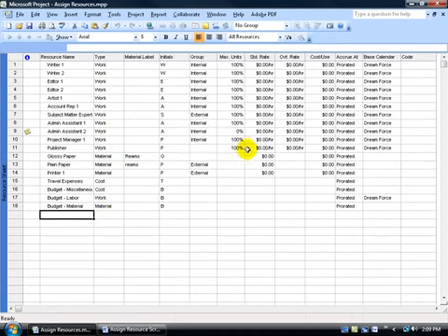Now keep in mind we haven't assigned any of our resources a cost. Like for our writer, you've got your hourly rate, your overtime rate, or your one-time cost per use. So you could say, instead of charging editor 1 $10 an hour, he just says, give me $1,000 and I'll get it all done. There's your one-time cost use. You may want to assign your cost use before you assign these resources to your task, and I'll cover assigning the costs in the resource cost training video later on. For right now, we're just going to do it without it and assign our work resources to our task.